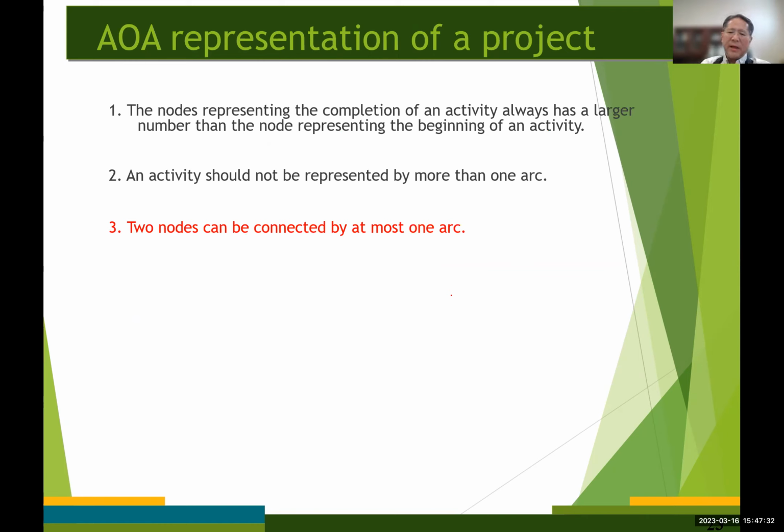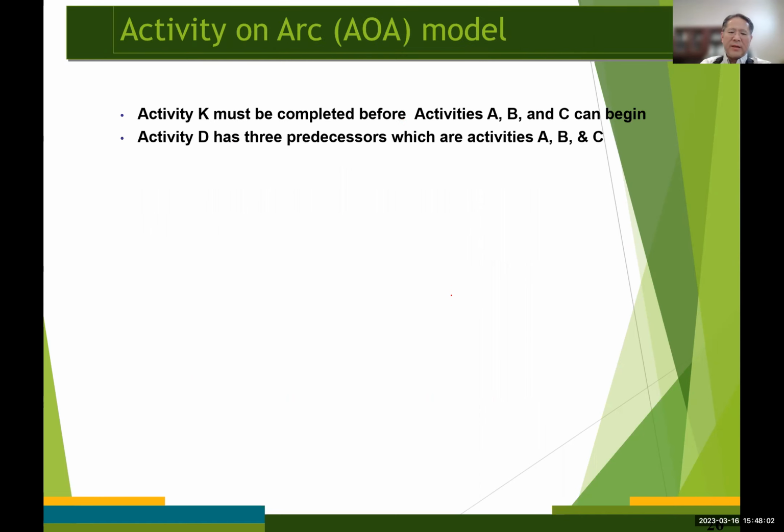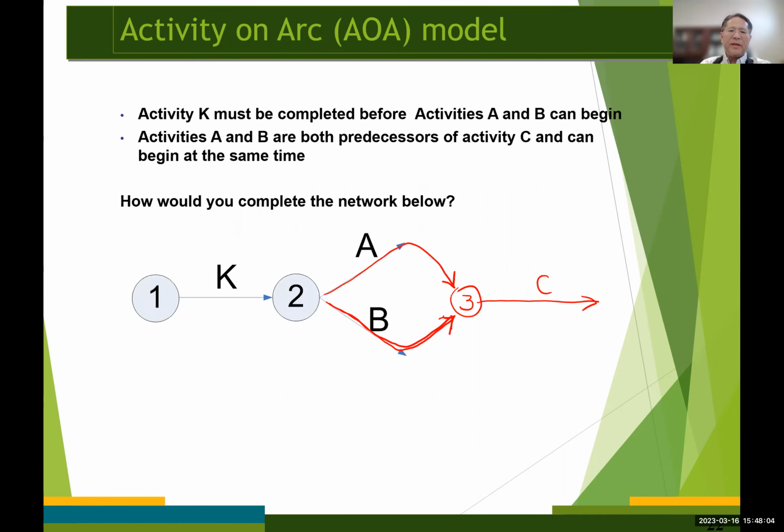The dummy activity has no work content. It usually takes 0 time, and it doesn't have any work content in it. It's usually drawn with a dashed line. By using the dummy activity, our case can be handled like this.